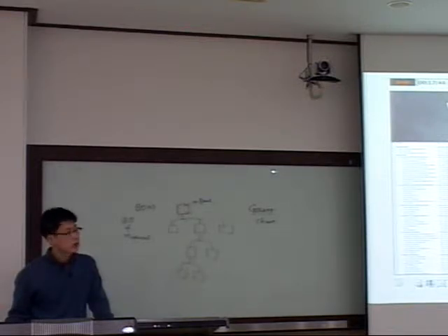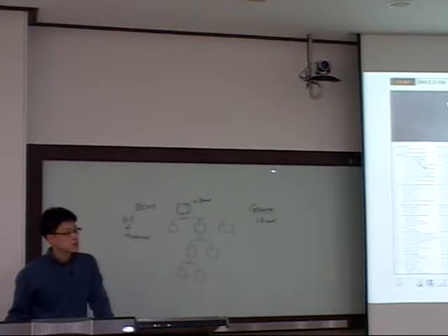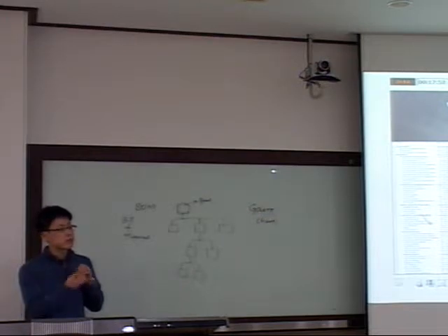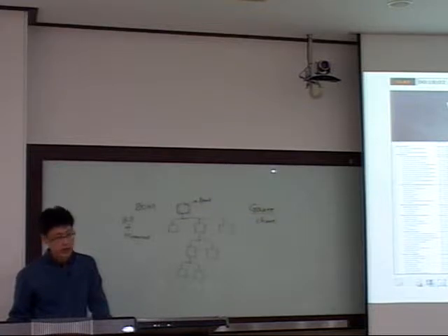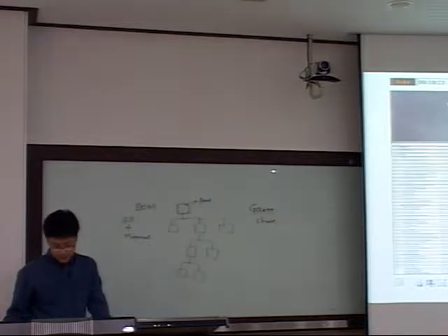Also, there is one more piece of information. In order to do some task, other tasks should be completed first, beforehand. That precedence information is also in each of these tasks, which determines the arrow connections. Based on that, they do the scheduling. It's very basic project management. It's one simple other example of how this work breakdown works.